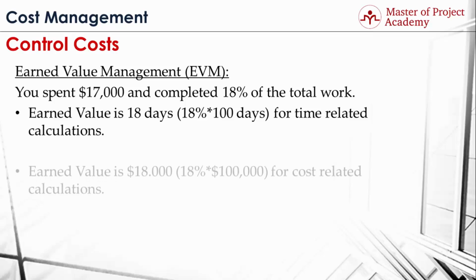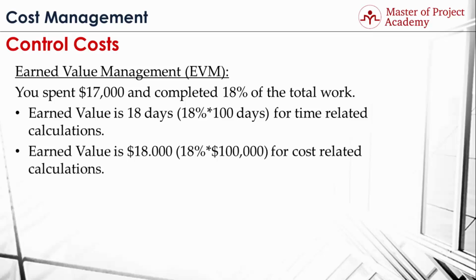Earned value is $18,000 for cost-related calculations, because similarly, 18% of the total work has been completed, and since our total work was at $100,000 cost, 18% of it makes $18,000 as earned value.